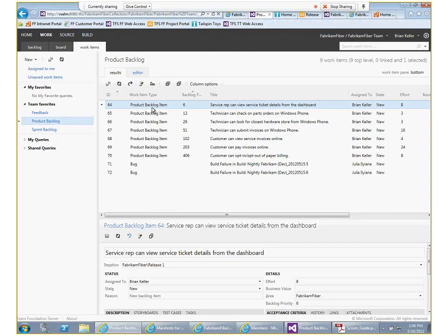If you have, let's say, something that needs to be taken care of as a risk, you put it in the product backlog. Basically, there are things that the team needs to work on, and they also need to be prioritized by the product owner, right? So notice that my backlog also includes bugs in here. I want to be able to prioritize or order my effort for the team throughout everything. Bugs, and if your Agile template has something else, such as quality of service like you used to have in MSF 4.2 or anything else that you decide to create, these should all be part of the backlog so that, following real Scrum, you prioritize them together as a team and not in some separate list.